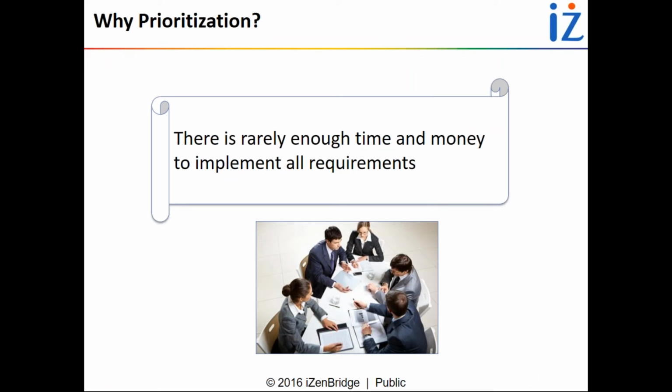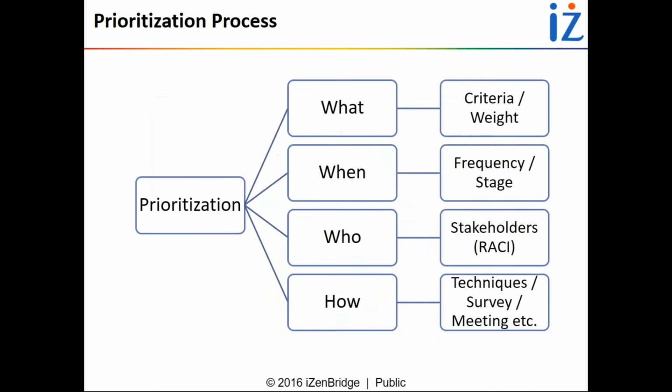yes, it is true that some level of requirement prioritization has been done, but these are the big requirements. You elaborate them further, and within that further elaboration, you need prioritization. You cannot deliver all the requirements within the available time frame. You have to consider time and money, which are the constraints in the project environment. So it is very important to do prioritization at different levels.